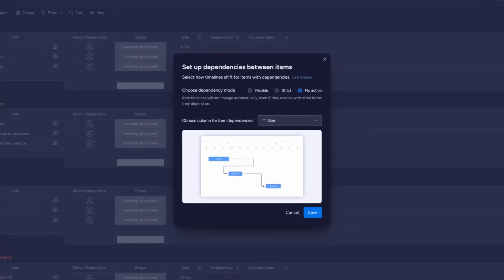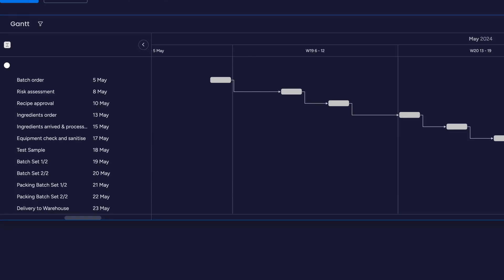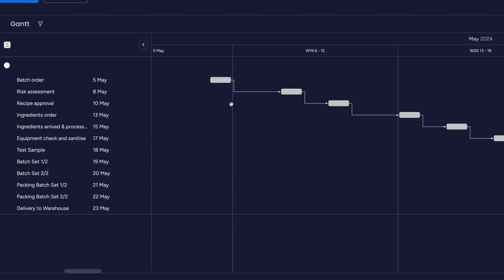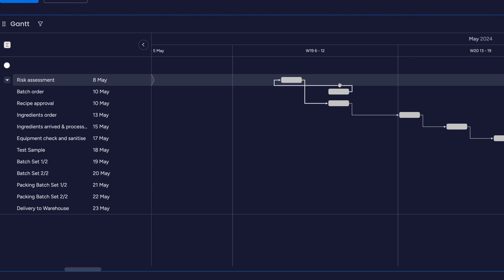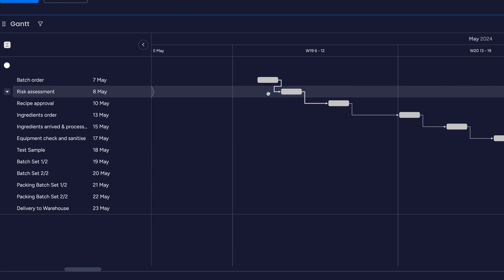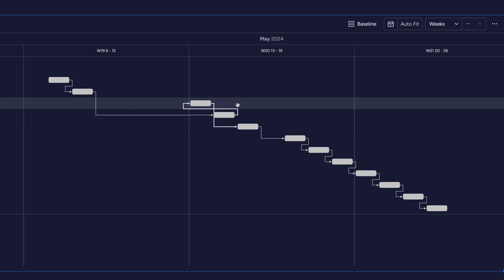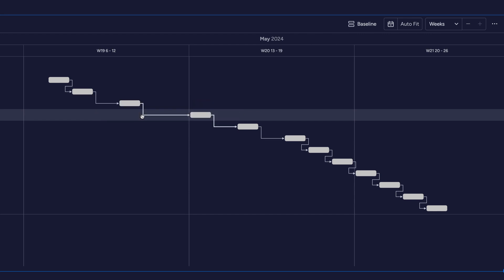Finally, No Action mode will not adjust dates at all. If you move the parent item date past the child date, or vice versa, the dates won't move. This one is useful if you don't want the dates in the board to move automatically, but still want to highlight what parent item should be done before you start the child.